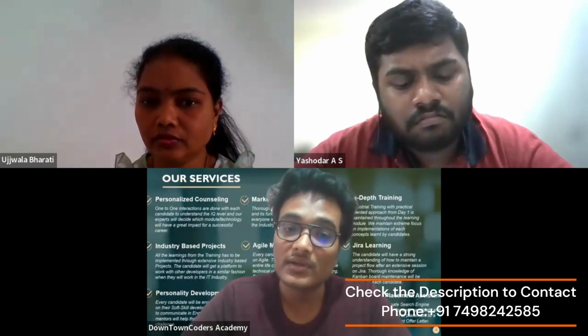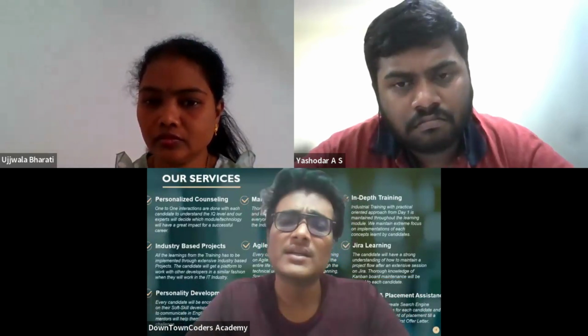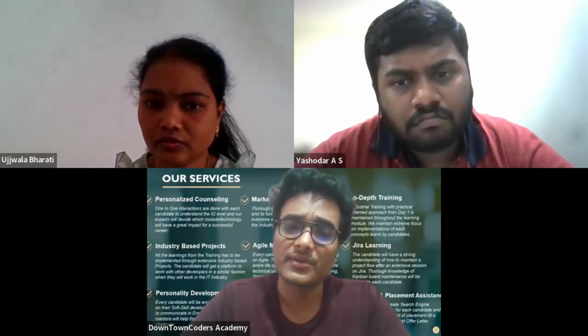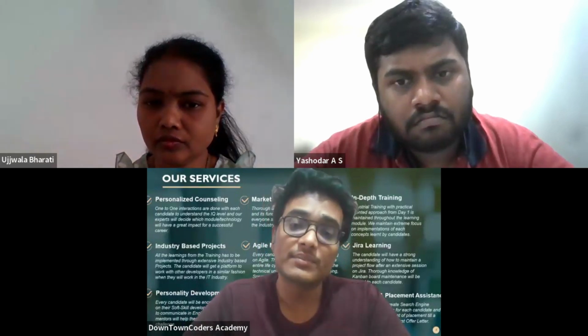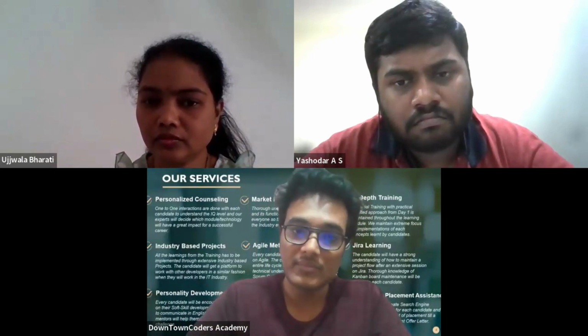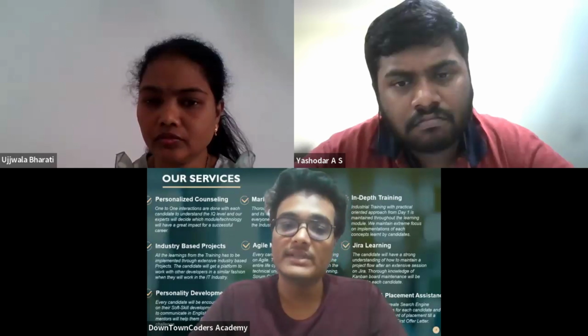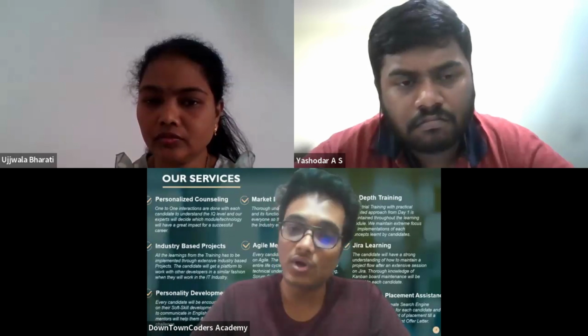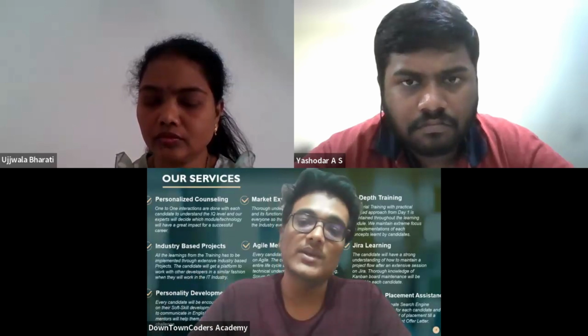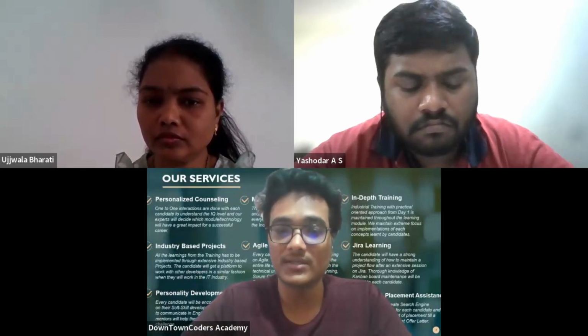We identified the various integrations and also defined the data migration strategies. We ensured that we prioritize the customizations and configurations because that generally takes a lot of time. And once those things were finalized, we set up our deliverables: the functional requirement document, as well as the fit gap analysis, and we also discussed the data migration strategies.